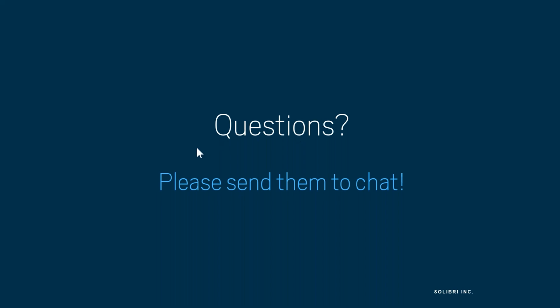Yes, so that's a good topic too. It does vary wildly at the moment, dependent on the organisation and the organisation's appetite to do the work, which I think is really why it's quite important to align the scope at the start of the project and make sure that PI cover is appropriate. Because of this exact reason, if a barrier question was mentioned earlier, this is potentially another barrier as well. If we're trying to implement this process retrospectively on a team, if the PI isn't adequate in order for them to do it, then we have to think about other mechanisms for doing it.